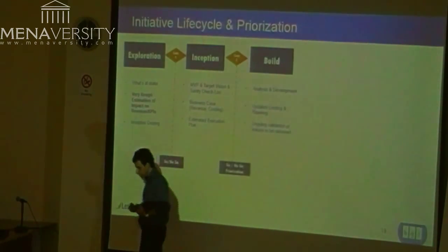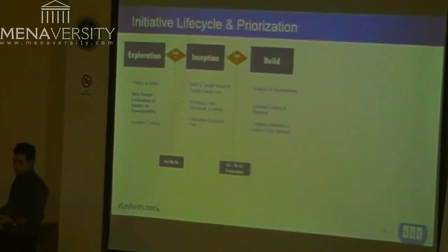And we really had to do a lot of education with the management to explain this. Because whenever they had an idea, they would say, okay, when will I get this into production? So it was always about dates, dates, dates. We explained to them that the dates will get clearer the further we go down the road in the process. So we were giving dates every time for the end of a phase, which they accepted. And they accepted we might be wrong, even at the build phase, where we might discover surprises. So there's a lot of education effort to be done towards management so that they can integrate this.